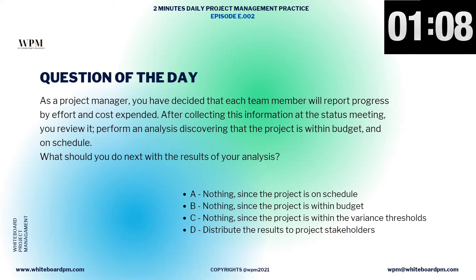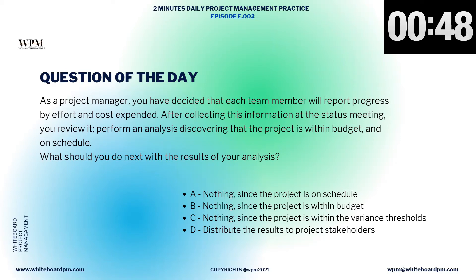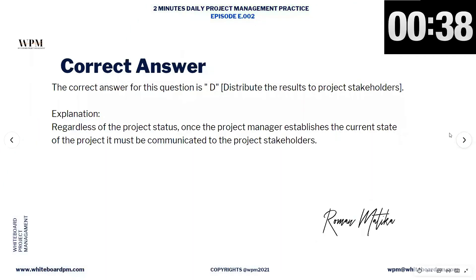So it's clear the project is within budget and on schedule. For you as a project manager, options A, B, and C are not correct because you should not do nothing. As a project manager, you should always distribute the results to the project stakeholders, either when the results are above budget or behind schedule. So the correct answer for this question is D: Distribute the results to project stakeholders.